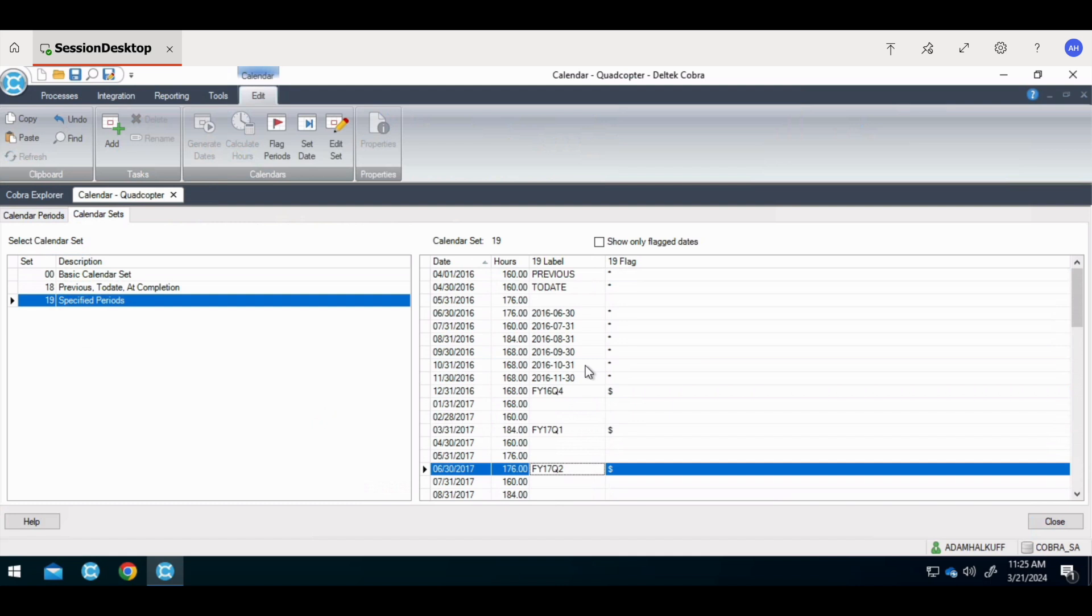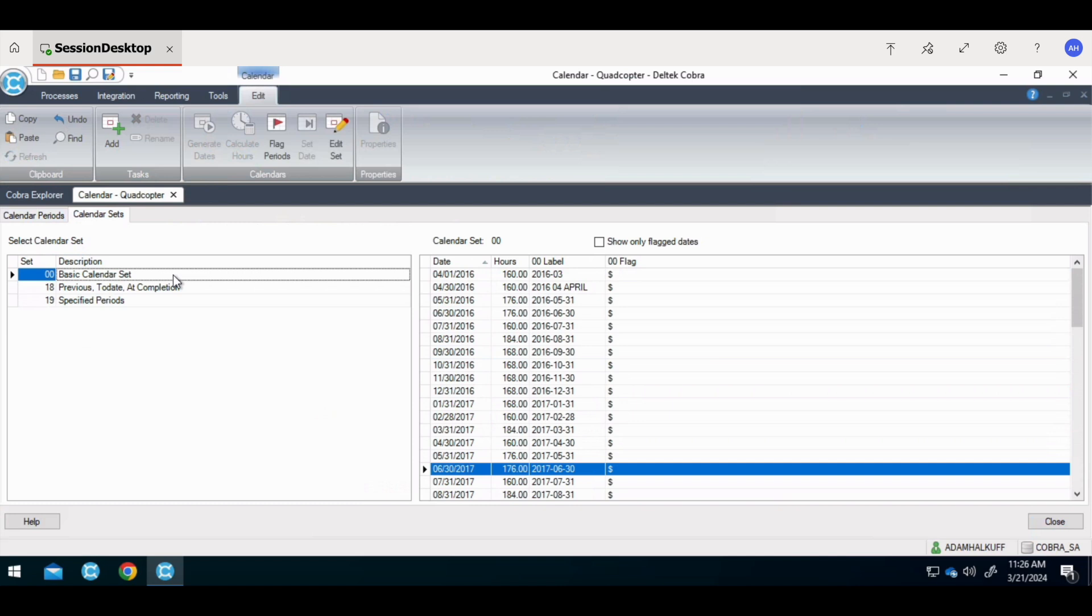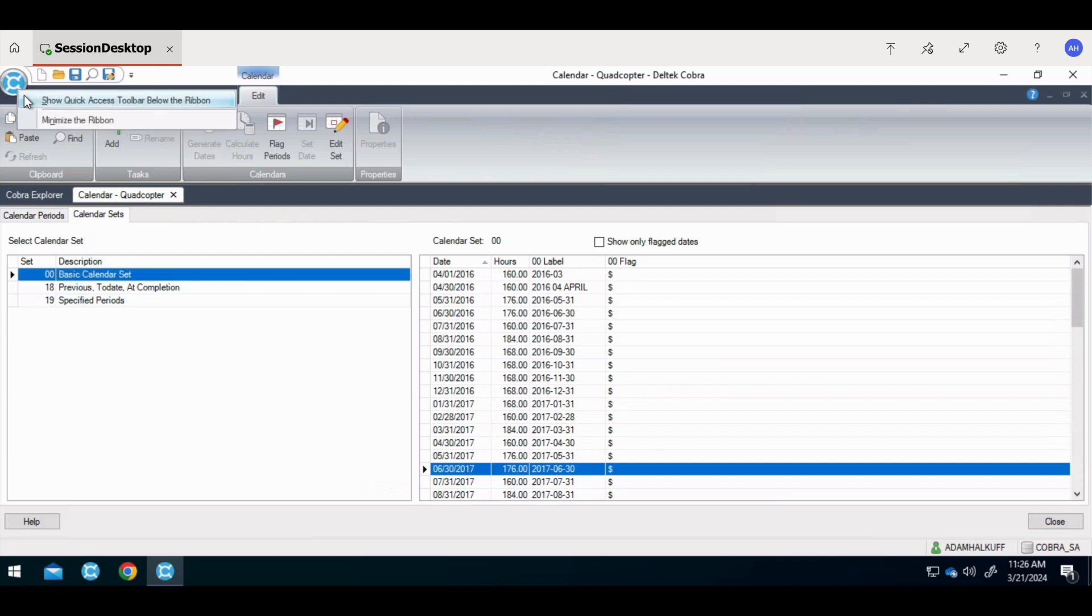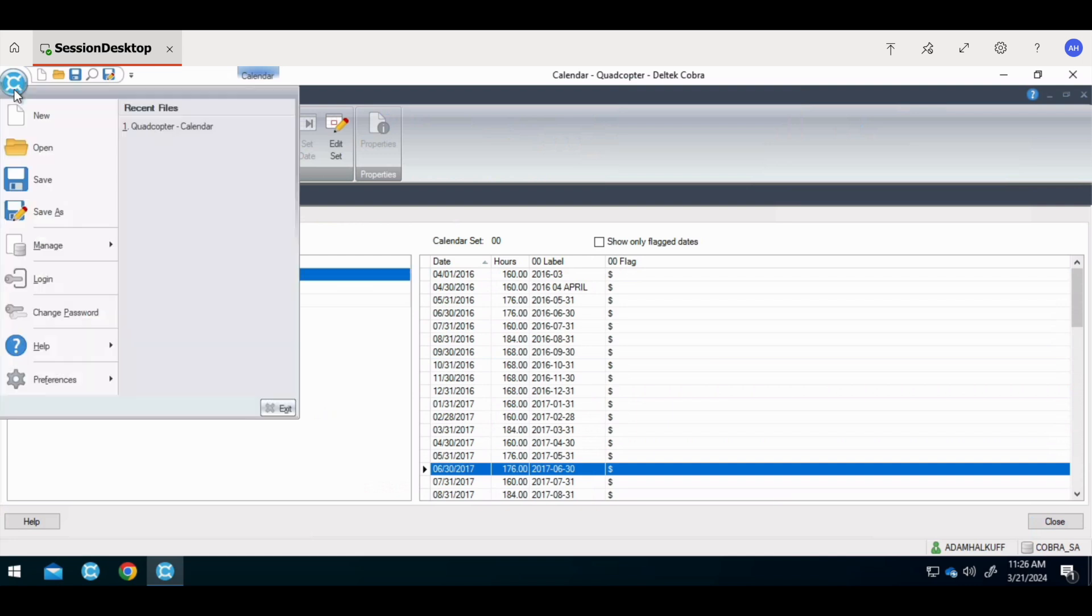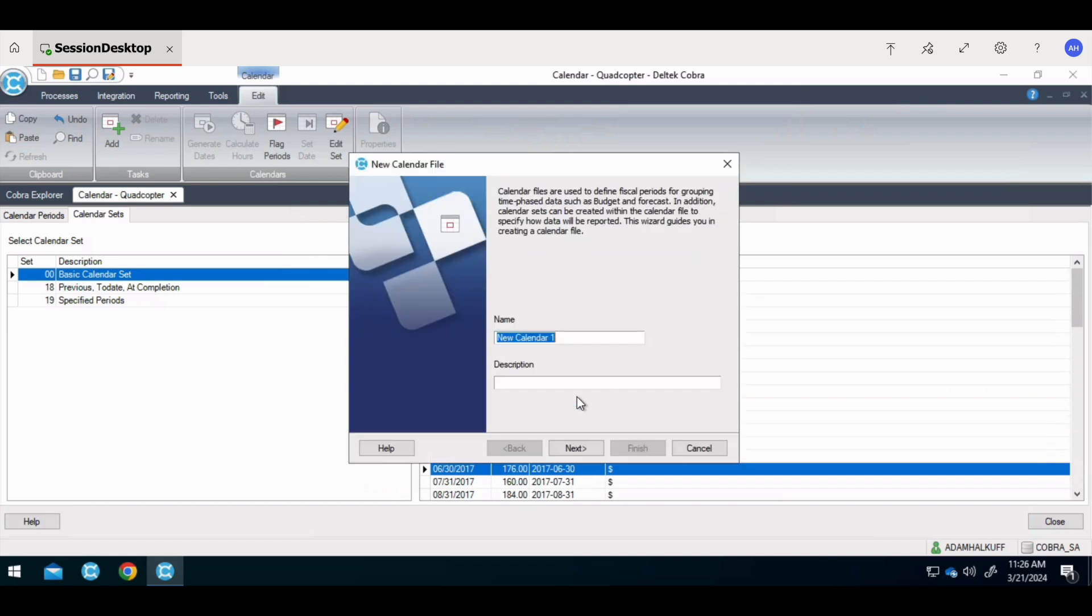When creating a calendar in Cobra, it's important to align the calendar with your organizational financial reporting calendar. There are two ways to create a calendar in Cobra. Both ways start with utilizing the calendar wizard and using the options. The first method is to use the dates provided through the wizard. The second is to import the dates and hours that reconcile to the business's accounting calendar. This training uses the dates provided through the wizard.